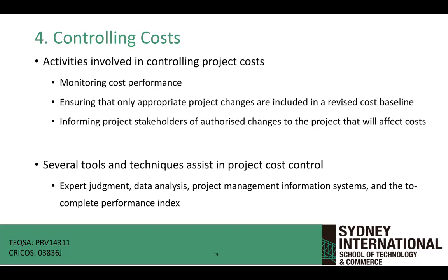If someone comes and tells me I want to have a change, I have to ask myself this question. Is that change going to add value? Is that change really required? Is that change really recommended? Is that change going to cause any risk on my project? I have to create that assessment to be able to decide what really needs to be done at a particular point of time. So ensuring that only appropriate project changes are included in a revised cost baseline is really important to bear in mind.